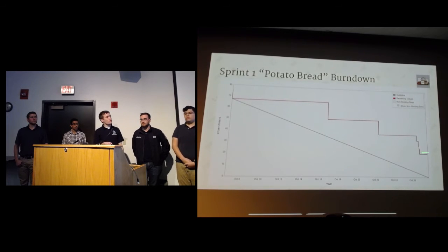In addition, we didn't really meet our goal here. We realized it was because of the extra technical debt that we missed with Sprint 0, like setting up our development environments completely.